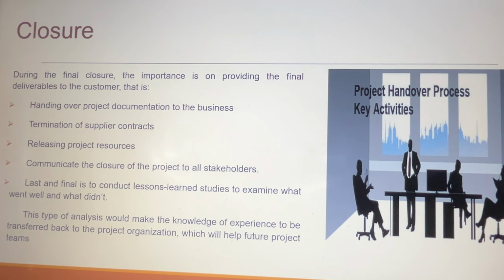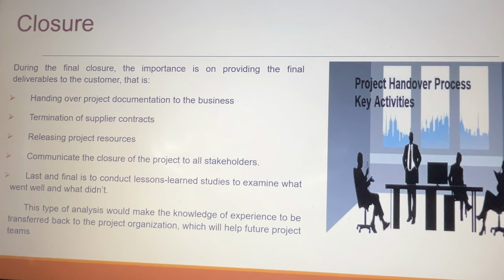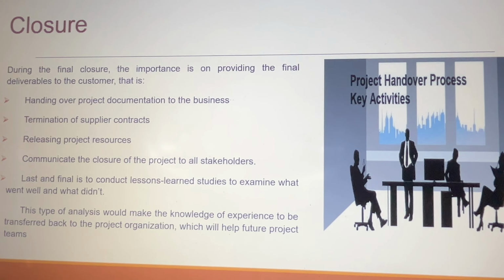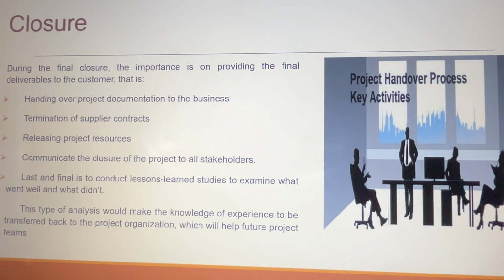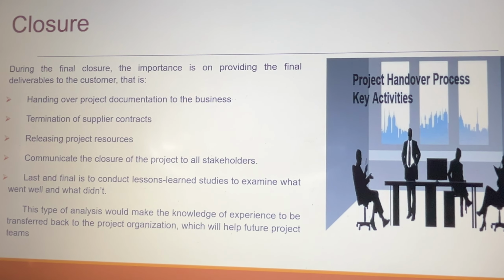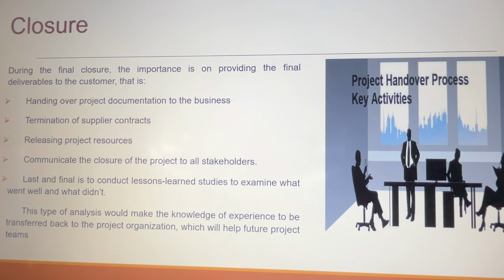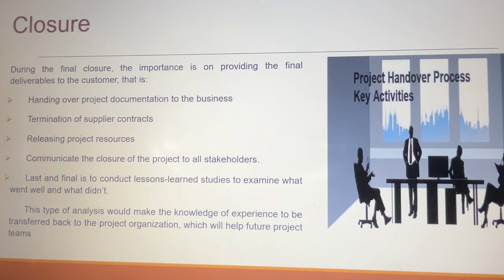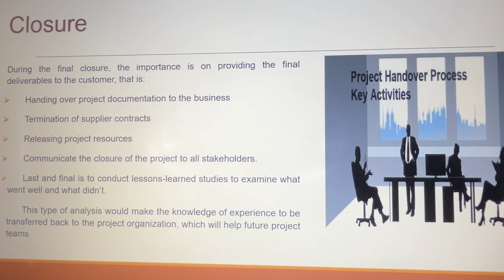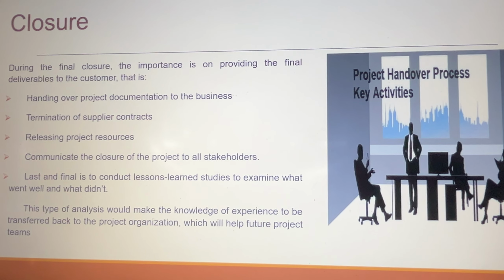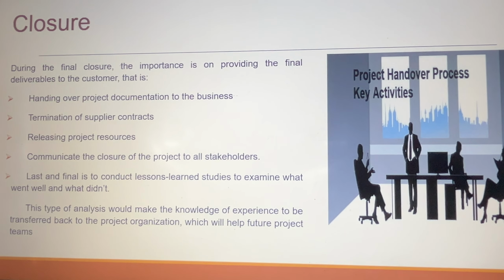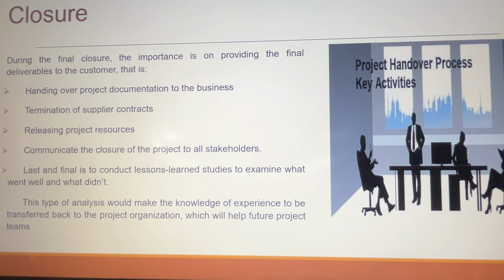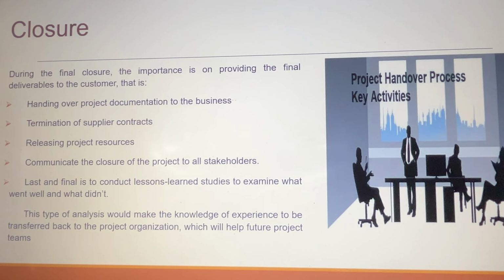Closure. During the final closure, the emphasis is on providing the final deliverables to the customer, that is handing over the project documentation to the business, terminating the supplier contracts, and releasing project resources. You have to communicate the closure of the project to all the stakeholders present in the meeting. Last and final is to conduct lessons learned studies to examine what went well and what didn't, what worked out in the project and what was not executed. This type of analysis builds the knowledge of experience on what has to be done in future projects, and it has to be transferred back to the project organization, which will help future project teams.